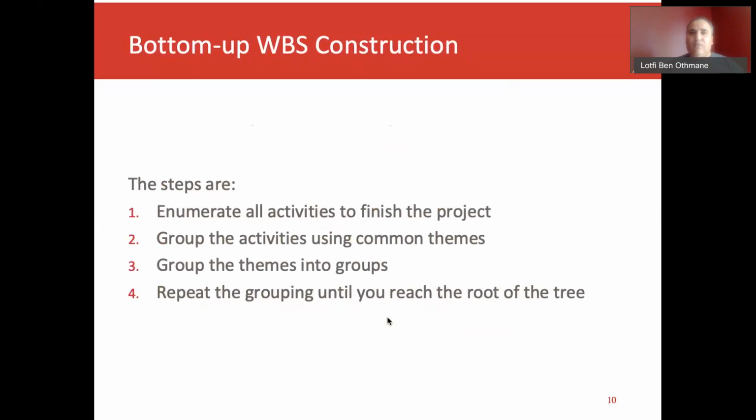So in the top-down approach, we start with the first level, then at the second level we divide the project into, let's say, deliverables or phases. Then we decompose these phases or deliverables into more manageable activities, and we could go through the decomposition levels until we get something that is manageable. In the bottom-up, it's the opposite.